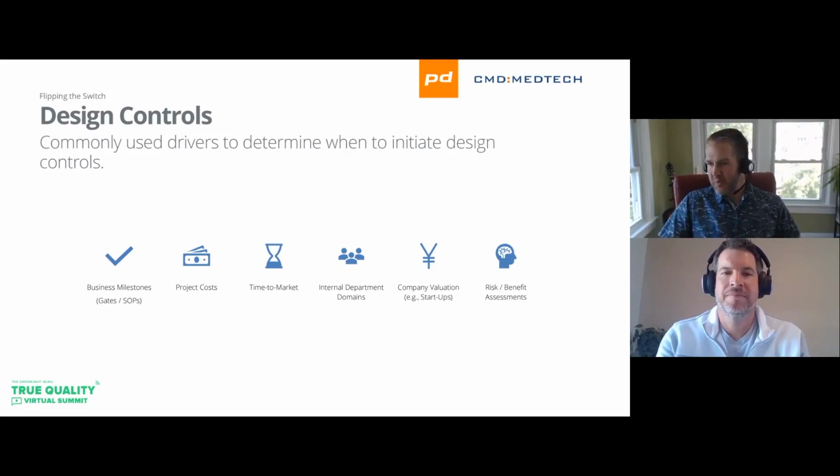We might have some competitors that are launching devices, or we have a trade show that we're trying to get a device to, something like that really pushes a date versus doing a good job at a bottoms-up approach of developing a schedule with dependencies, with some built-in slack for some risks that, if anyone's worked on a development program, there's always things that pop up that we didn't expect to pop up.